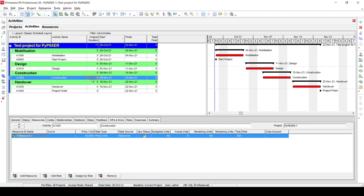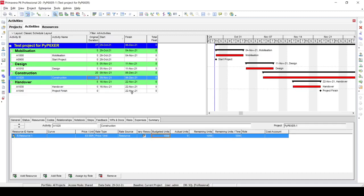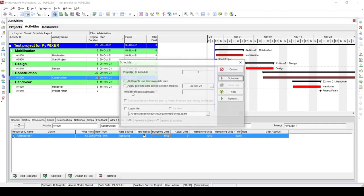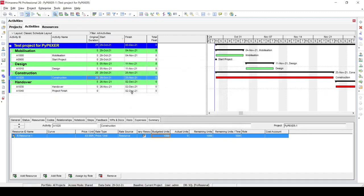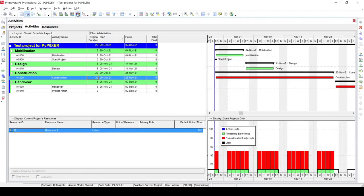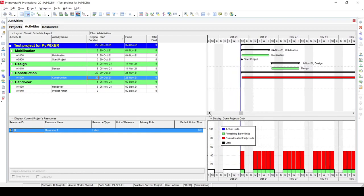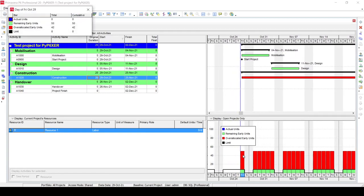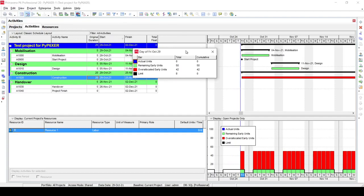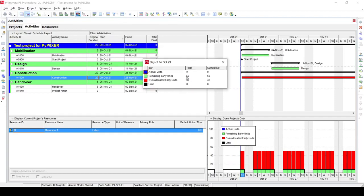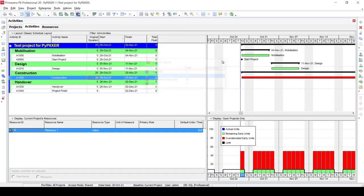Another thing we'll do just to make it easy to look at the calculation - we'll make this 20 days and the budgeted units 1,000 just to make things a bit easier. Then I'll reschedule the activities and go to my resource histogram. What you can see here is the resources have an equal amount for every day, which is 50 units per day. These 50 units are basically the 1,000 divided by the 20 days of duration that we have.